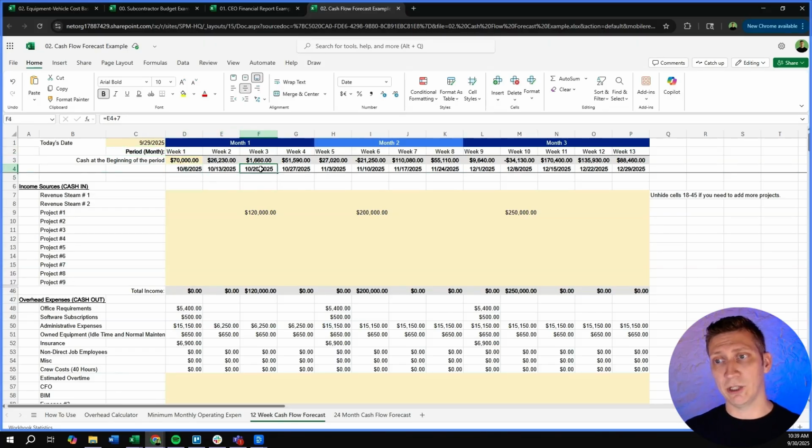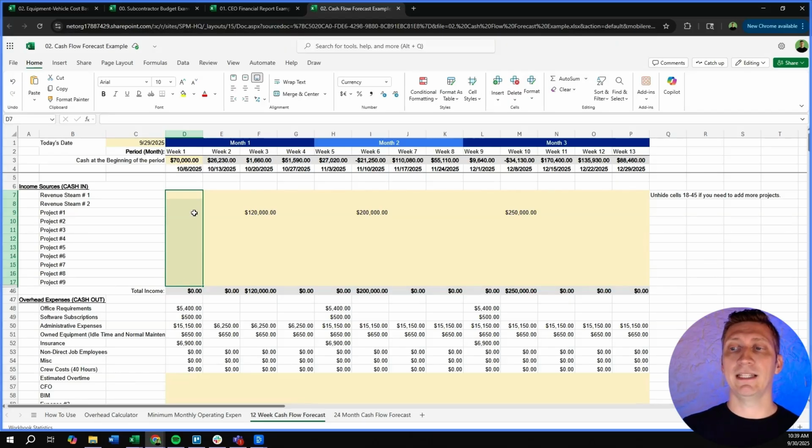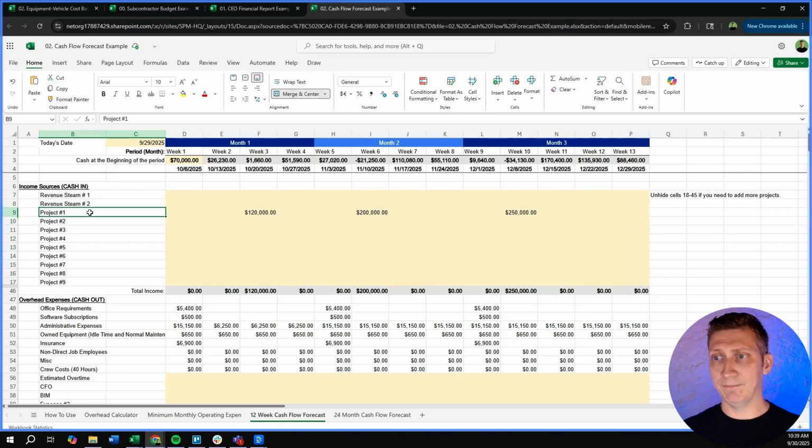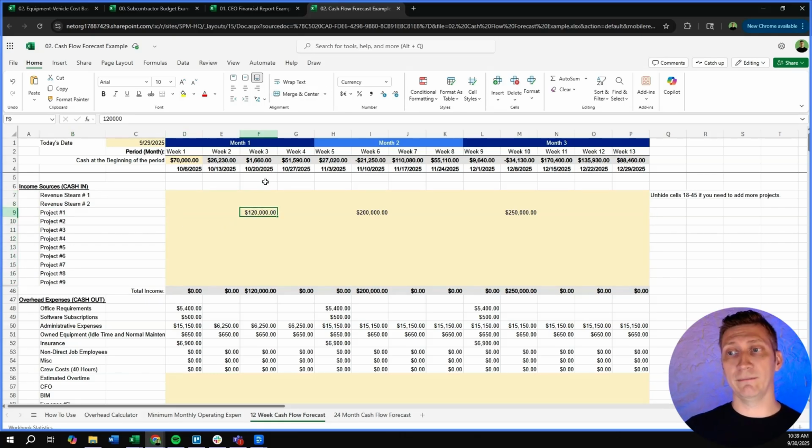So when we started this week, we had $70,000 in our bank account on Monday the 6th, right? So what you're going to do is any costs that happened this week, this Friday, or next week are going to happen next week. That's where we time them. Any money that's coming in. So we'll say project 1. This is where you're going to have $120,000 coming in the third week of the month.